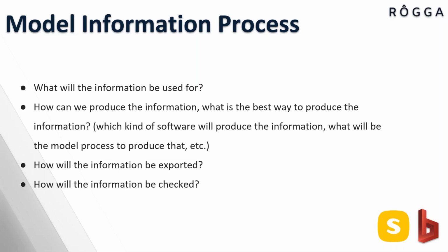Yes, I have a second example. I need the information on the location of the objects, because my cost estimation has the same work breakdown structure as the planning team. So I need to send the quantities and the costs to the correct place in our WBS. Oh, great. Yeah, this is not native information, so probably we will not have it in the native tool.